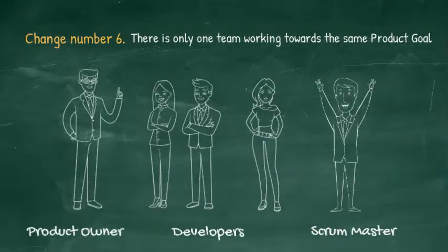We hope that this change will help us to encourage the product owner and the developers to collaborate towards achieving the same product goal. It is also explicitly said that if the Scrum team becomes too large or has more than 10 people, it should be split into multiple cohesive Scrum teams that work towards the same product goal, product backlog, and also product owner.